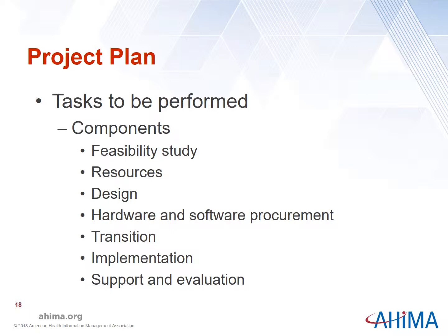The project plan should describe each task to be completed, how it will be completed, who is responsible for completion, when a task should begin, and when the task should be finished. The basic components of the plan are as follows: feasibility study, resources, design, hardware and software procurement, transition, implementation, support, and evaluation.